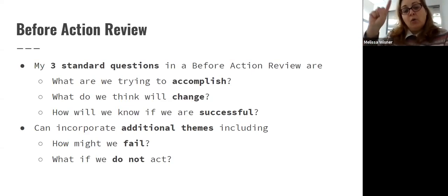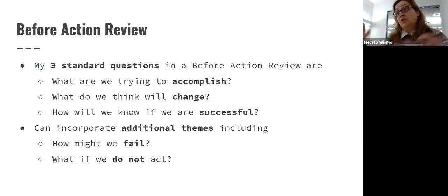And when you walk through these three questions, I try to have at least three big whiteboards in a room when I do this, one dedicated to each of these questions. And you can start with one, or just tell people, hey, if you have a thought in any one of these areas, feel free to start there. But once you have a good amount of conversation going and intake on the boards, if that's the format that you're choosing to conduct this, what you'll begin to see sometimes are themes across these three areas.